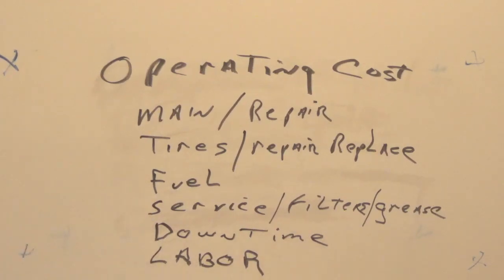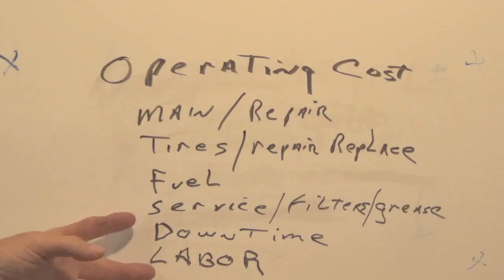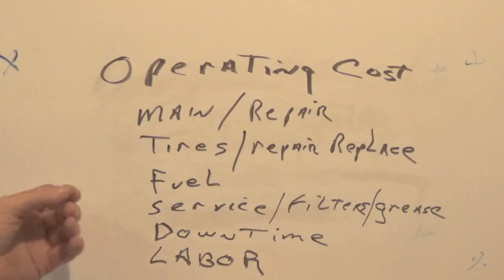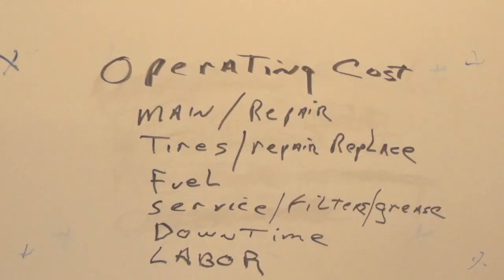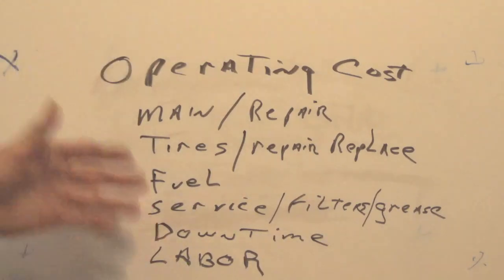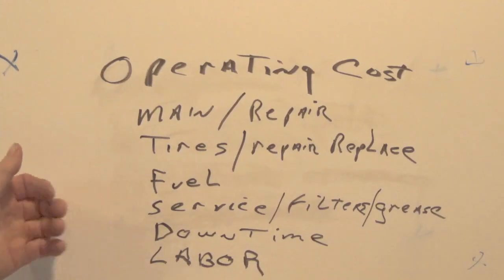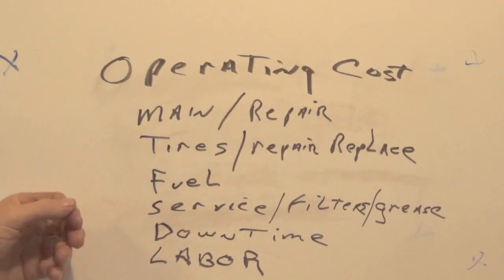Now what a lot of people will do, because the most common man doesn't understand this, most business people will give a lump sum to move equipment. Like maybe they'll say, okay, $250 to bring the equipment over. Now, it may not cost $250. This is why you do all this math. Like say it takes an hour to get there. It may not cost $250 to get there. It might be a lot less.